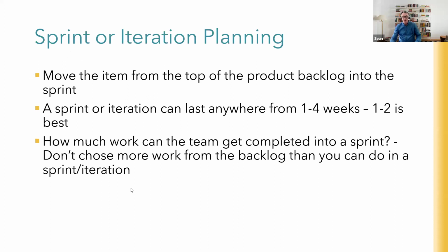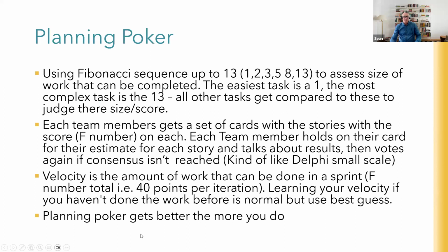So how exactly do you figure out or estimate the amount of work or effort required for a particular user story? Basically, everybody reads the user story, and there's lots of different ways, and teams have slightly different methods. There's planning poker, where everybody actually gets poker cards, and you can buy them online. And they might use the Fibonacci sequence. I've seen one though, that used the actual playing cards of Ace, King, Queen, Jack, 10, and each one was assigned a number. And when you held up the user story that everybody read, they all held up their playing card, and that was translated to a number, and then consensus was arrived at.